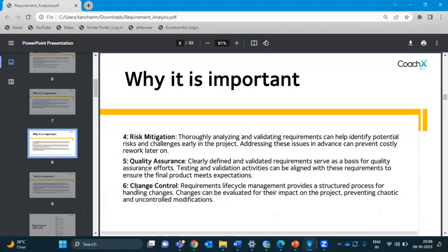And then change control. Now, what is change control? This we already discussed. When you're developing something, you have requirement management in place. The client asks you to maybe add one more feature. So you would see whether it is okay to include now, and how it affects other things. There should be a process in place where you do a feasibility check on whatever change the client is asking: is it okay to include in this sprint, or should we wait?